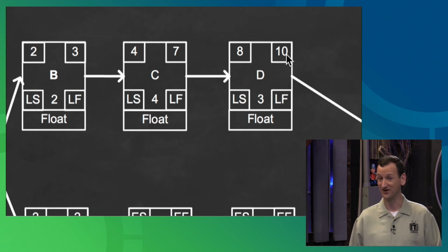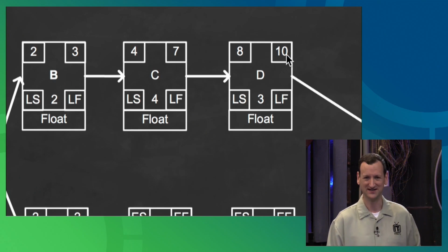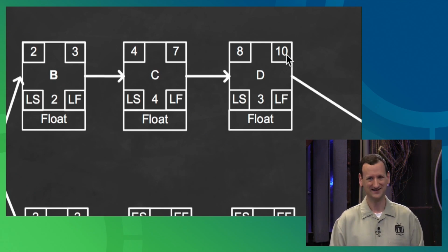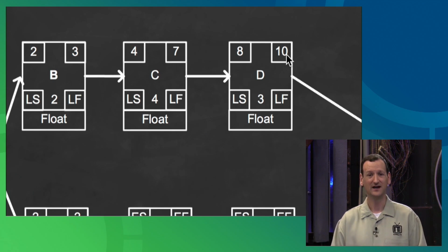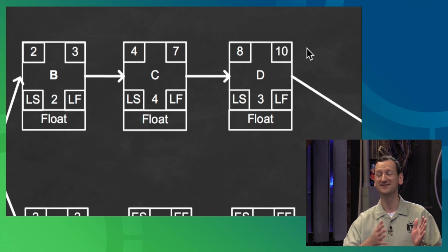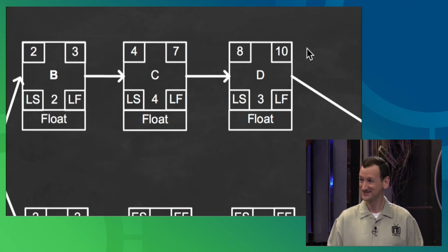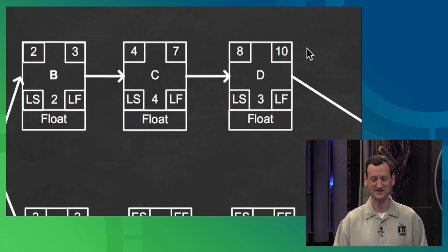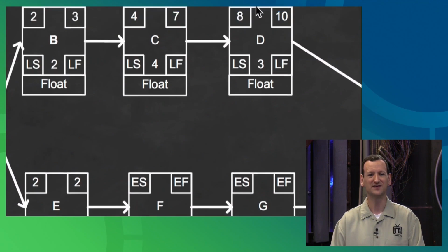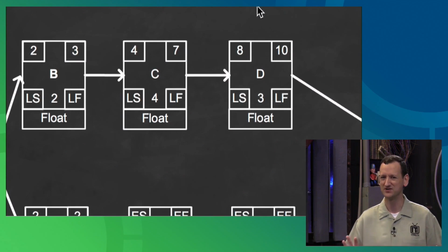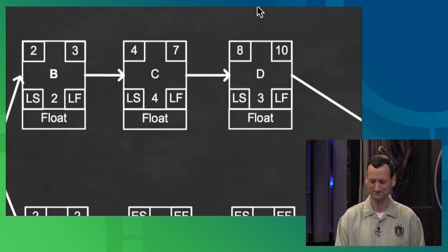And boy, there's another complexity. They won't hit you with this on the exam, but what if you have to factor weekends into this, right? If you have to factor weekends in, I might have 2 days that we can't work. And so I might start on the 8th and finish on the 12th because maybe the 9th and the 10th were Saturday and Sunday. Right? So that's when things really start to get a little bit messy. But fortunately, your other path will be doing the exact same thing, and so you'll have that same delay for both. But that's where project management software really comes in handy.